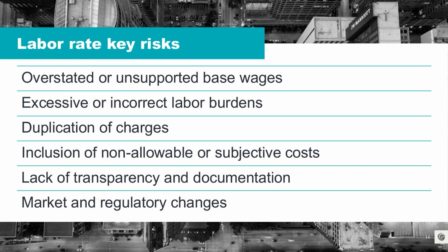Duplication of charges. Fringe benefits, especially things like vacation, sick time, holidays, might be included in the labor rates, but then also potentially billed separately, resulting in double charges. So your analysis needs to clarify which costs are included in the hourly rate versus which are reimbursed separately.